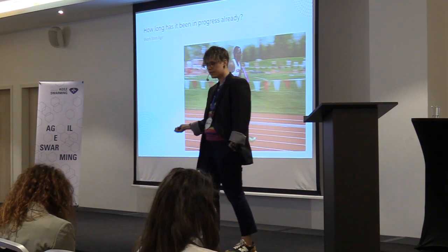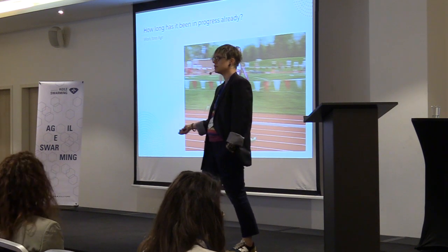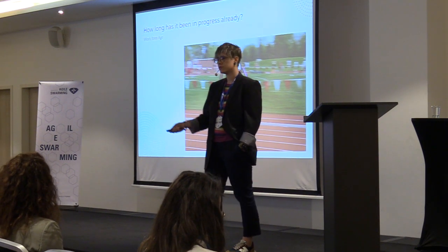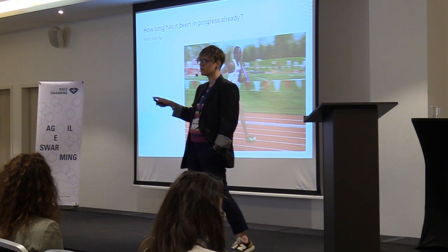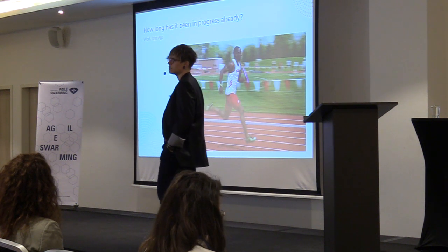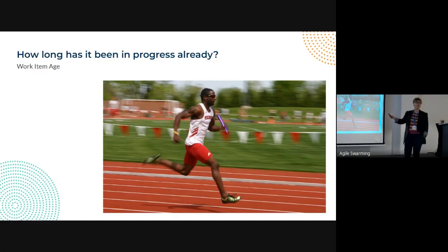What we learned is that it has to stay there. There is no one to take over, because the person who was working on it has to fix some very urgent bug and work on that high priority item. And there was no one with the competences to take it over. So actually looking at the work item age revealed a silo that we had in the team. So you see, instead of going through more data gathering during the retro, we actually focused on how do we break down the silo, because this is the impediment for the team.